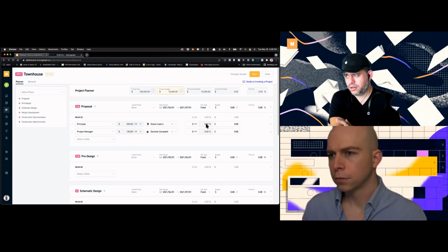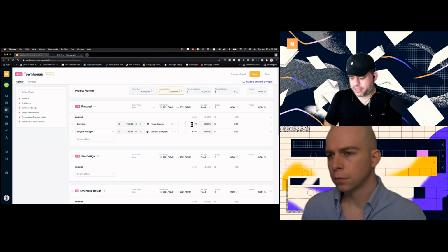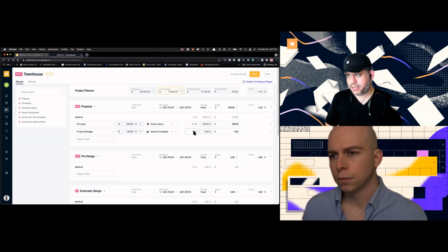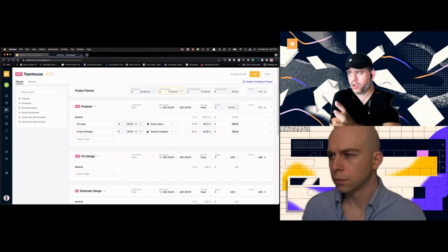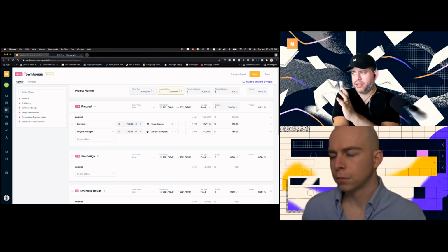We could do it based on the number of hours we want to spend. I just want to make sure I'm only spending 1 hour at max putting this proposal together, just overseeing it. Danielle's going to spend maybe 3 hours working on it. So we have $700 allocated to this. We can block this, right? Now this is going to be taken out from the original budget and it's going to stay there.